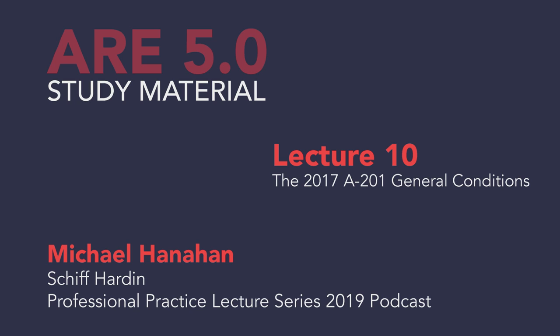And then 4214, they will review and respond to requests for information, RFI. That's requests for information about the contract documents. They will be made in writing in any time limits agreed upon or otherwise reasonable promptness, 7 to 10 days you want to respond to in an RFI, and they will prepare and issue supplemental drawings and specifications if necessary. Again, same thing, as this is the process that they need to do in answer to your question from earlier.